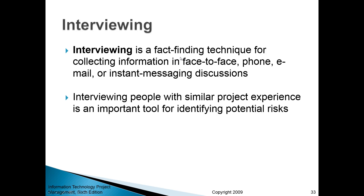Interviewing is another fact-finding technique. It typically means asking people face-to-face, by phone, email, or instant messaging regarding their ideas. You approach people and ask them about what they see as a potential risk in relation to a particular project. Interviews can be done individually or in a group, more like a focus group, where you ask the same question to a group of people and record everyone's response. Naturally, you need to interview people who have relevant project experience, although sometimes talking to people outside the risk area is worthwhile as well, because they may give you outside-the-box ideas — people with similar experience tend to converge on similar ideas.